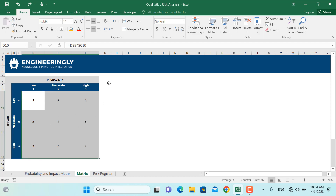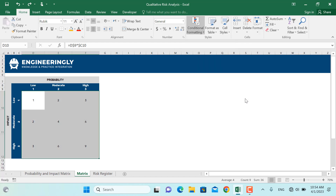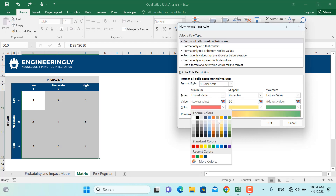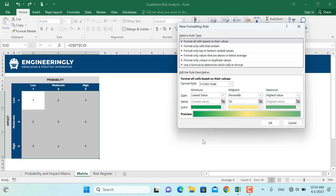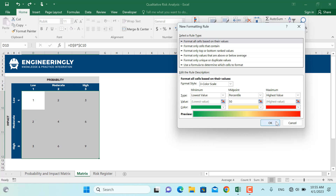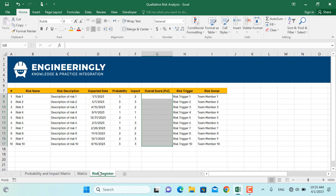The next step is to color code our values. I'll go to Conditional Formatting, then Color Scales, then More Rules. I'll select a three-color scale: for the lowest value we'll use green since the impact is very low, for the medium level we'll leave it as yellow, and for the highest level we'll select red, then click OK. As you can see, risks with low probability and low impact appear in green, while risks with high probability and high impact appear in red. The next step is to assign this format to our risk register.